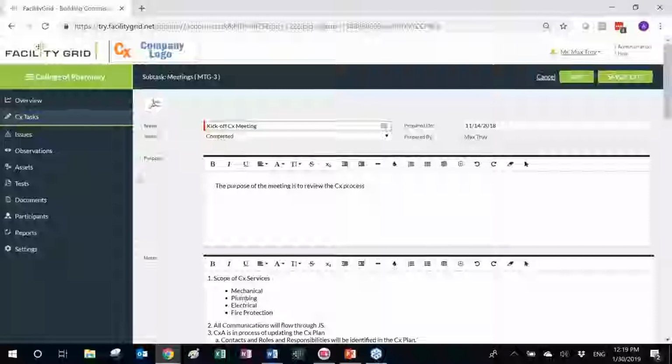The submittals get posted on those construction management platforms, and then the engineer of record is notified that a submittal is available. Then the submittal gets downloaded by the engineer of record, and then the commissioning team is also notified of those submittals and is required to conduct concurrent reviews of the submittals and communicate their comments to the engineer of record.